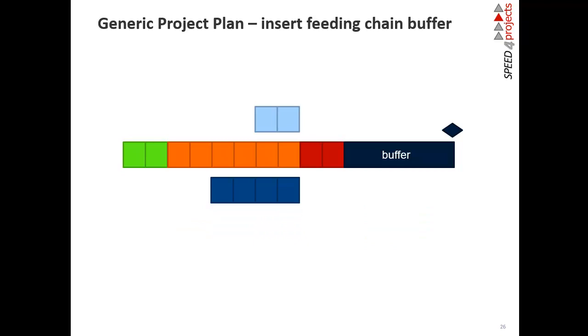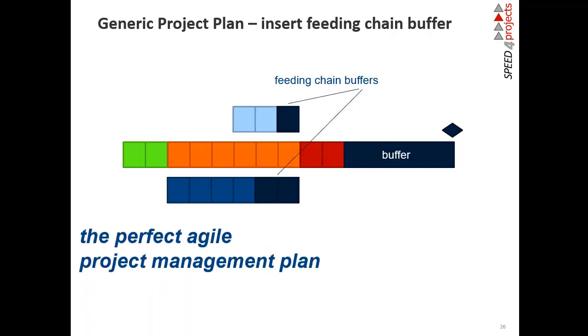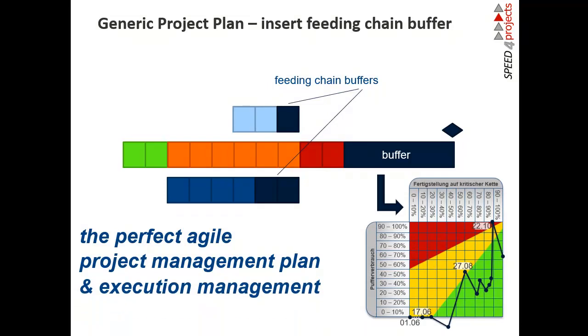If you are looking quite near, you see the blue parts are delivering with the orange one into the red. That's a very critical situation, the integration phase. If one of these three is delayed, the integration phase is delayed. So what we are doing in Critical Chain is moving these delivery chains a little forward in time, so that we get delivery buffers or feeding chain buffers. In the Excel, it will be called feeding chain offset. That's a complete Critical Chain plan with agile integrated.